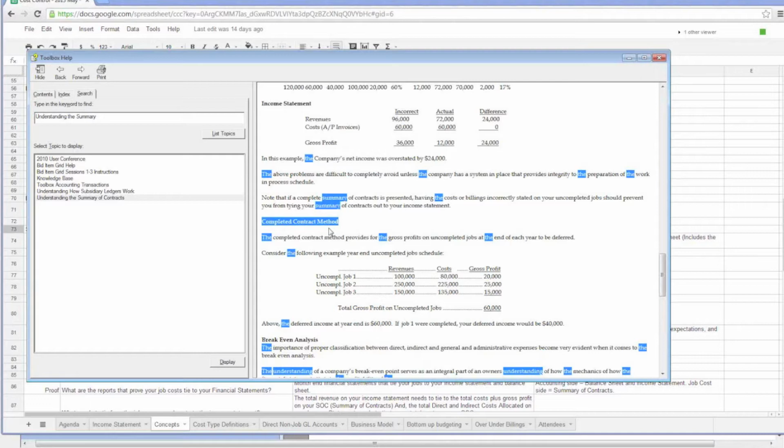If they are not doing a spec home or they don't own the project, they should be on a percentage completion method. And in GAAP accounting, sometimes you'll hear accountants say it's generally accepted accounting principles to be on a completed contract method. But there's a twist there.